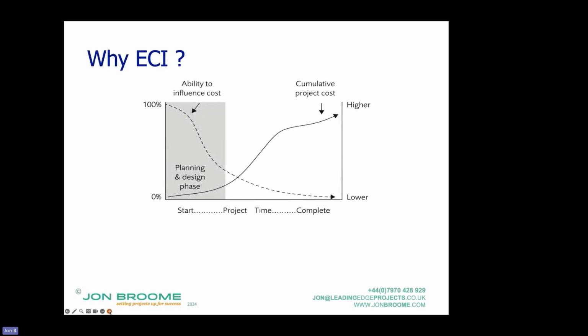On early contractor involvement. So this is a real zoom through it. So what is ECI? It's early contractor involvement. Or why ECI? Why do it? Well, it's this diagram. When you look at it logically, does it make sense to get involved the party who's going to spend 85, 90% of your costs on a contract, when effectively they're already committed because you've made all the big decisions here? Why not get this person in here when they can add the most value?